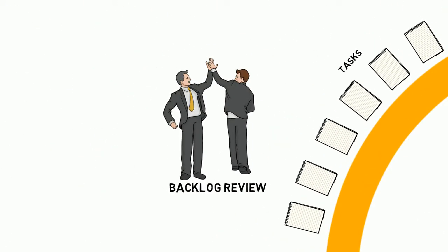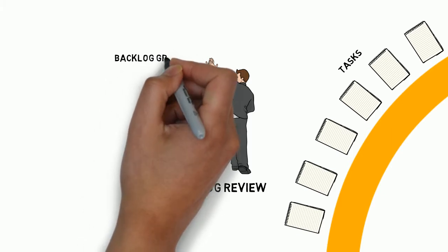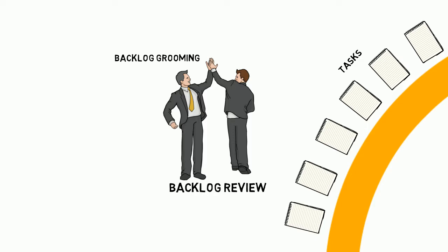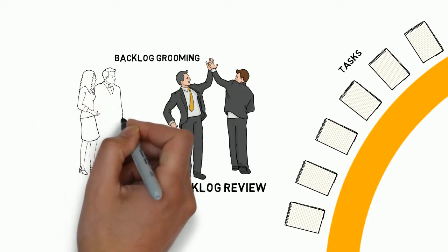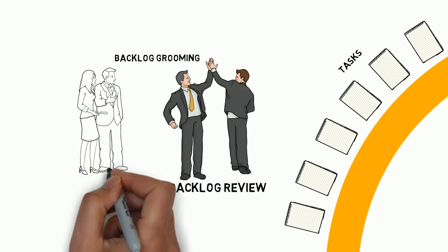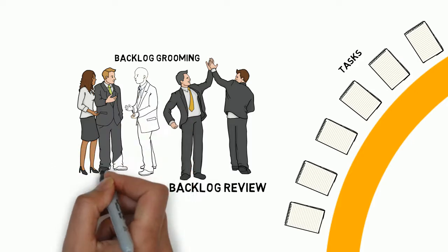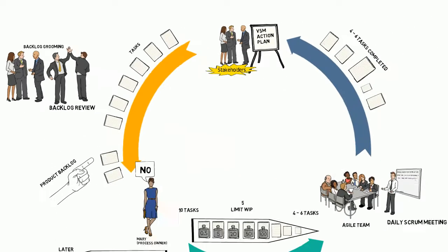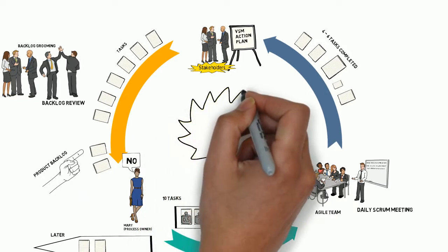All this stuff I've been talking about, estimating the value and effort of the actions, prioritising, splitting, all that is usually called backlog grooming. Mary would run a backlog review meeting weekly, and the whole team is there, and sometimes a few stakeholders as well. The agenda varies a bit. Sometimes it focuses on estimation and sometimes on splitting actions, etc. So I hope you're noticing the theme here: communication.